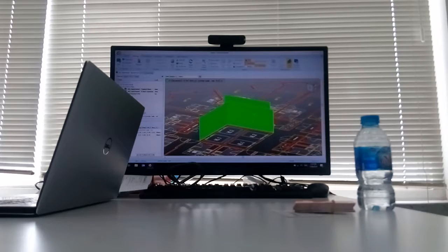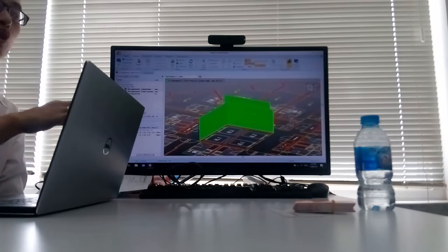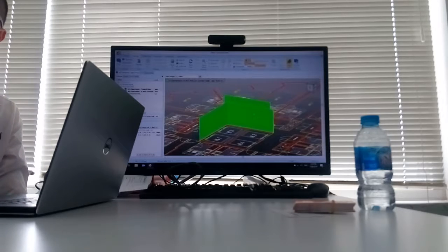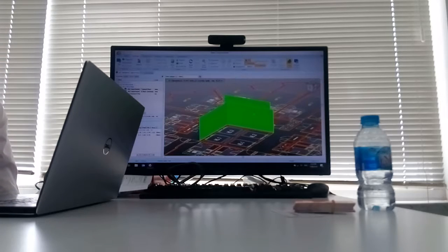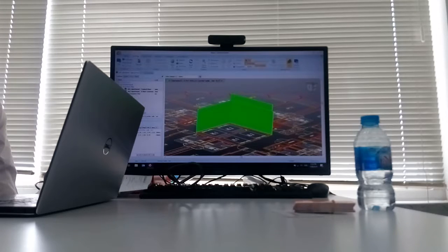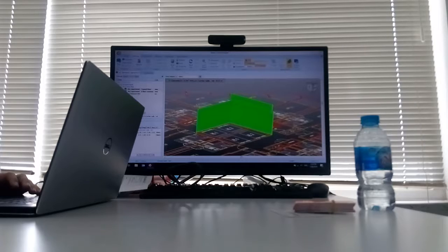So this is for those to measure the beam. In order to do this, you must really have the structural and the architectural drawings overlapped together. You must understand each of the walls, what the deduction is, and you need to input it individually inside. Adjustment, because this is not automated inside here. So the user must be very clear which type of beam this wall overlaps with. Can you show the structural drawing overlaid on it? Like I view it separately, because I do not put the drawing inside here. Cannot. Okay.